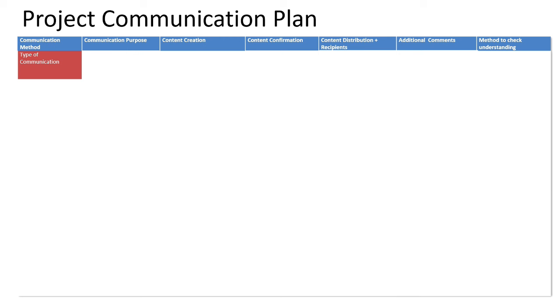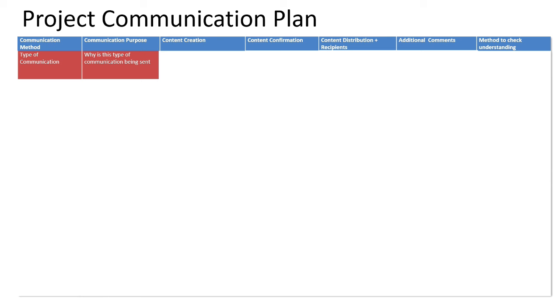Let's talk about each section so you understand what exactly you do in it. Communication method is the type of communication — you really have to think it through. How am I going to communicate with people? Not everybody deserves the same type of communication. You're going to talk to your project team very differently than your steering committee, senior executives, or the department receiving your deliverable. Communication purpose is why this type of communication is being sent.